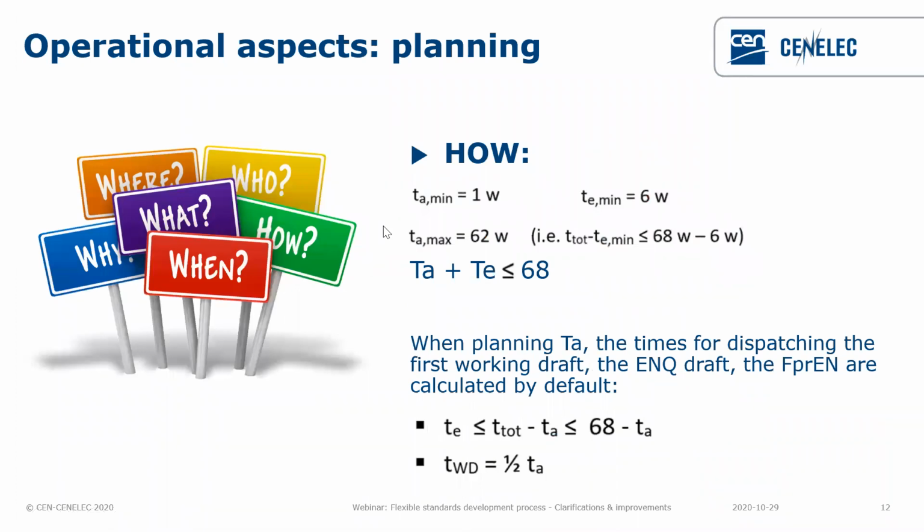Another question, from Jesse Matthew: I have a question about the time period available to convert the preliminary work item to a new work item. Is it within 2 years, within the new flexible process? Matthew, this has not been changed from the current rules. If I'm not mistaken, you have 3 years to convert the preliminary work item into a new work item.